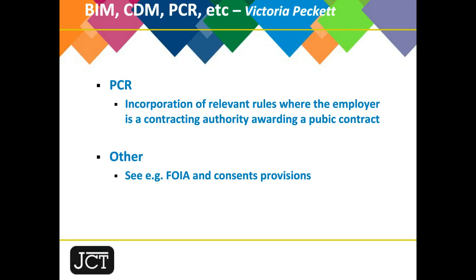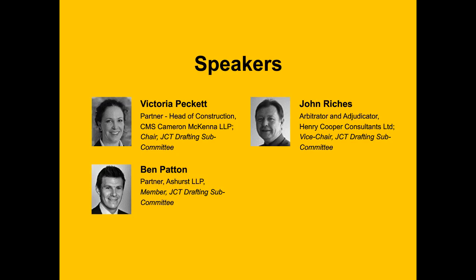The key now is we've simplified the start of the process, and what you're required to do in all of our contracts, including the intermediate form, is put in an interim valuation date, because that's the start of everything that we now do. And that ought to be a specific date. If it's not a specific date, by default it's 1 month after the date of possession. And the first interim valuation runs from that date. 7 days after that date becomes the due date.